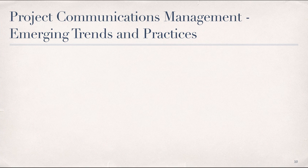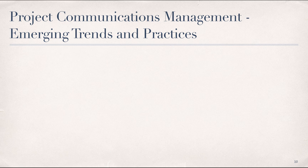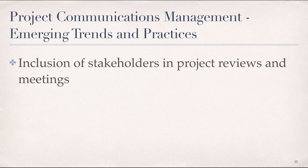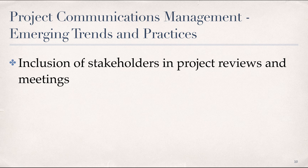There are several evolving and emerging trends and practices for project communications management, some of which we've already touched on. These include, but are not limited to, inclusion of stakeholders in project reviews and meetings. As we've discussed, successful project teams are inclusive of the stakeholder groups that are directly impacted by the project. An effective communication strategy, therefore, requires regular and timely reviews of the stakeholder community with updates to account for changes in stakeholder membership and attitudes and to ensure expectations are being met.